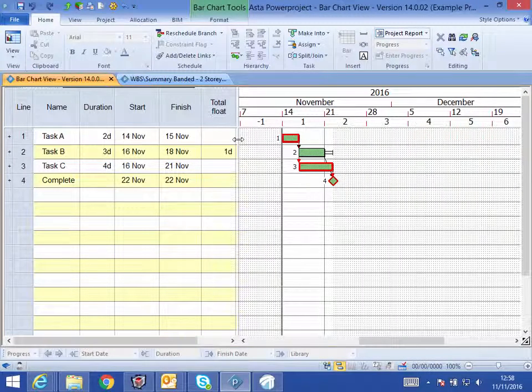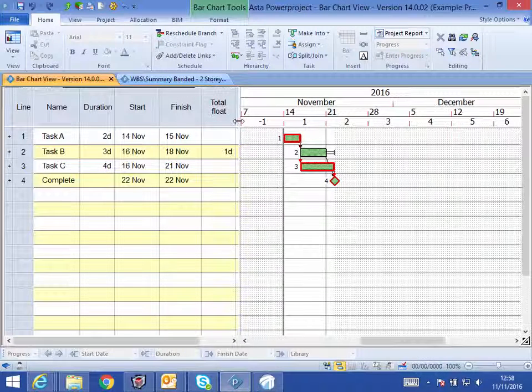On the reverse of this, critical activities have drag. This is the amount of time that an activity is adding to the project's duration. Or looked at another way, the amount of time a task can be reduced by to shorten a project's duration before it's no longer critical or its duration becomes zero and it therefore no longer affects the project's end date.